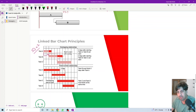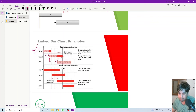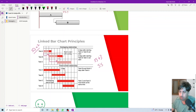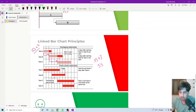If activity B and activity C are linked start-to-start, the relationship would be start-to-start plus three days. So activity C starts three days after activity B starts. When start-to-start has zero lag, they start at the same time. But with a three-day lag, you wait three days after activity B starts, then activity C starts. This is start-to-start plus three, and the other would be start-to-start plus two.